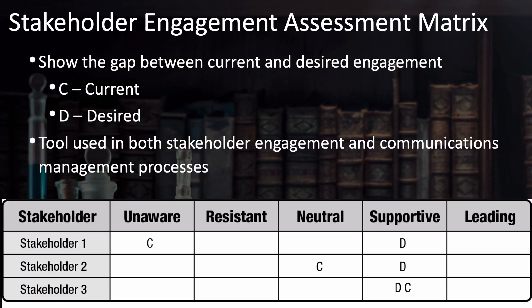The stakeholder engagement assessment matrix is a simple but useful and practical tool for analyzing stakeholders. It's used to show whether stakeholders are unaware of the project, resistant to it, neutral to it, supportive of it, or leading it. It shows the gap between their current level of engagement and the desired level of engagement. This tool is used in both stakeholder engagement and communications management processes.